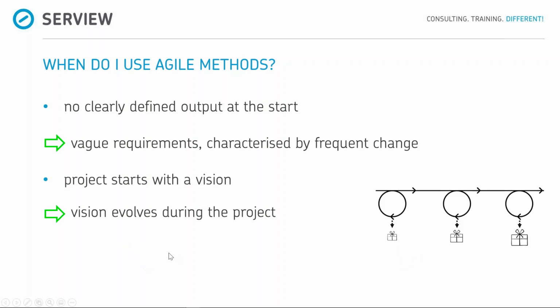Classic when highly regulated environment, not a lot of change, very foreseeable what you need. You know your output, it can be defined, not a lot of changes. Agile method, you don't know what you want, you know your problem, the solution is not yet clear, and it's something that's either highly risky, very changeable, or it's very unknown because it's, for instance, new. Then you would use something that is agile.